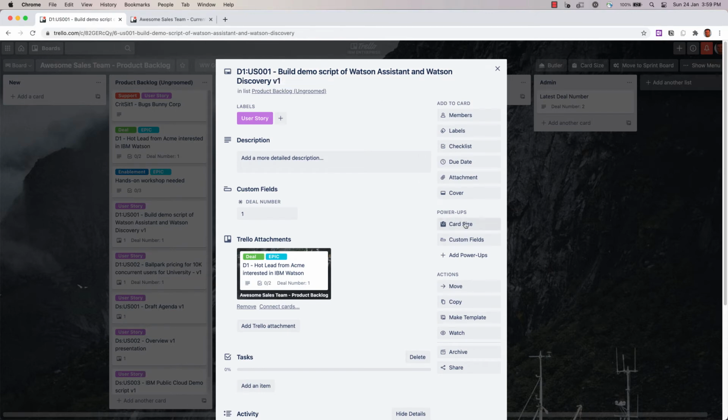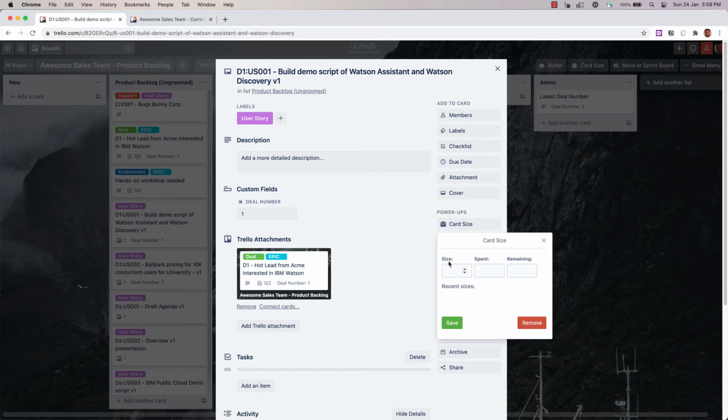And so we use this power up card size, and then I would use planning poker with the team and say, what do you think it will take to do this? And some folks will say, it's an hour. Some will say it's 8 hours, or what have you. So use the Fibonacci sequence to realize the cone of uncertainty, that we can't be very accurate with our estimate when we're talking 20, 30, 40 hours, things of that nature. But we probably are pretty accurate when we say it's an hour.